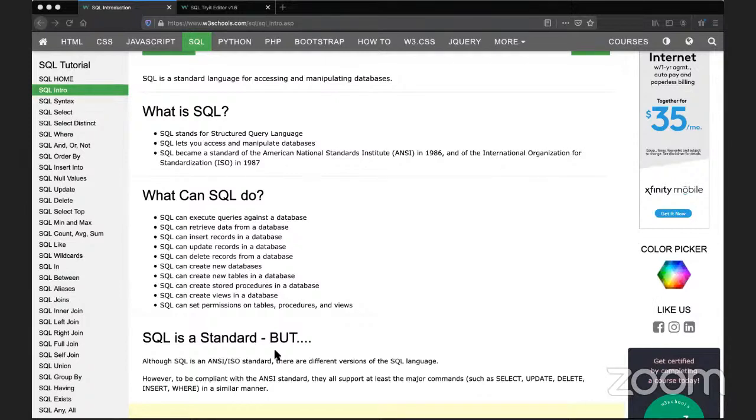The example that I remember has to do with, for instance, when students can enroll in an undergraduate program or postgraduate, that means you are combining two different things. Over here, it should be individual. That means you should have one requirement for undergraduates and then one just for postgraduates, so that you don't have two stories in one.